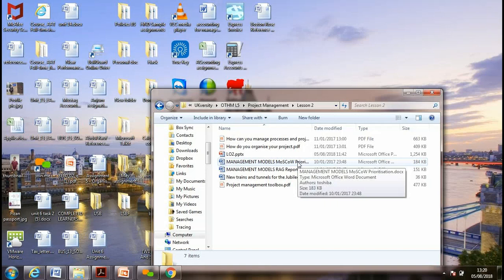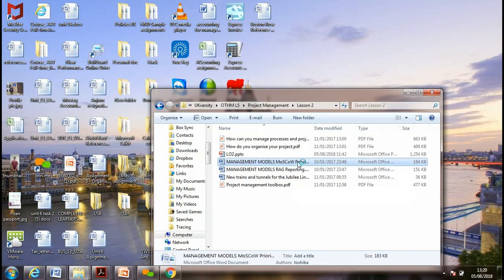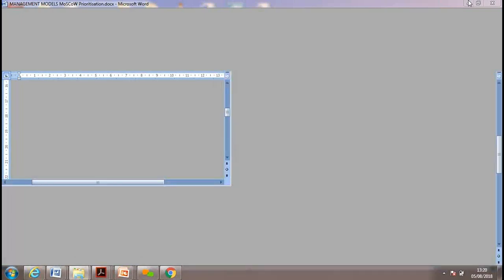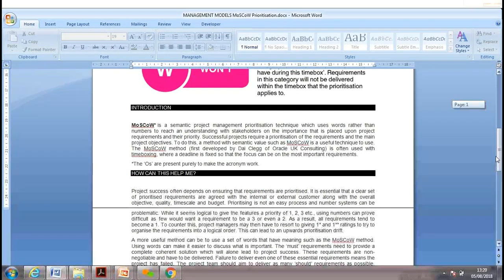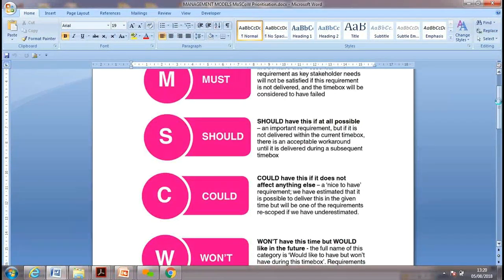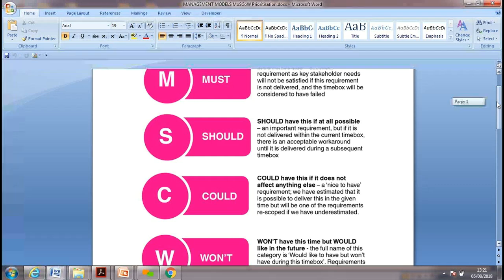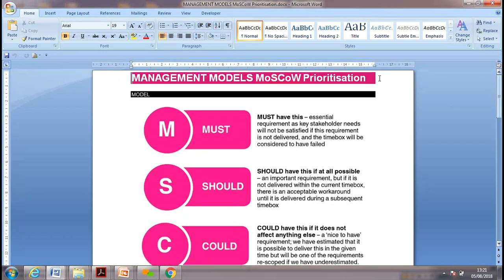These are the planning tools. It's called MoSCoW, that's the model. I'll upload this model as well for when you discuss planning, and the London Underground service as a case study of how they made the project. Must have, should have, could have, won't have: what we must, should, could or shouldn't do. This is a model to help us prioritize tasks.